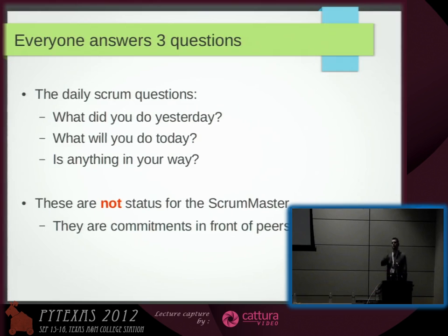Imagine this group of people here were my Scrum team, and we are standing up, and everybody just comes and says this, and it should be like 20 or 30 seconds per person. So if we have, I don't know, 7 or 9 people, that should go pretty fast. That's why we stand: you don't want to encourage any technical discussions or details, because then everybody's losing time. If we just do this blitz explanation of what's going on, it's very helpful.